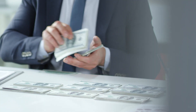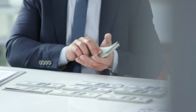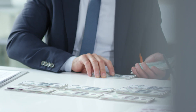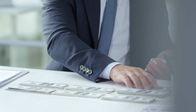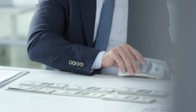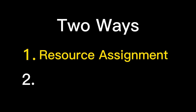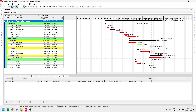Cost loading is a process of integrating the project cost to the activities. We have several ways to cost load the Primavera schedule. On this video, we will talk about the two ways of cost loading. The first one is by incorporating cost through resource assignment. For this to work, I am under the assumption that you already have the working schedule with defined calendars, activities with corresponding duration and dependencies.